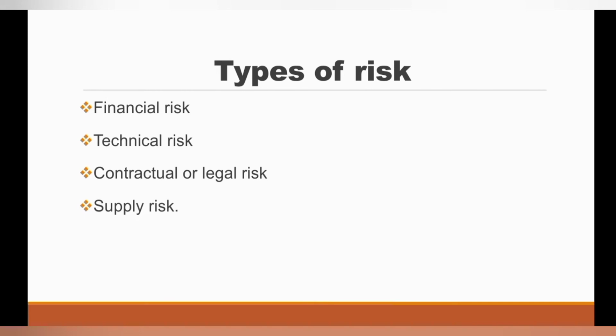Also, there can be a supply risk. The supply risk is associated with the supply chain disruptions. So it can arise because of the market instability or sometimes scarcity of resources. Sometimes it can even lead to the supplier failure or supply disruption. Sometimes force majeure elements can occur in such a way that there was no fault of either the supplier or the buyer, but there will be a disruption because of natural interventions. It can be heavy downpour or accident on the part of no parties, which can lead to a risk.